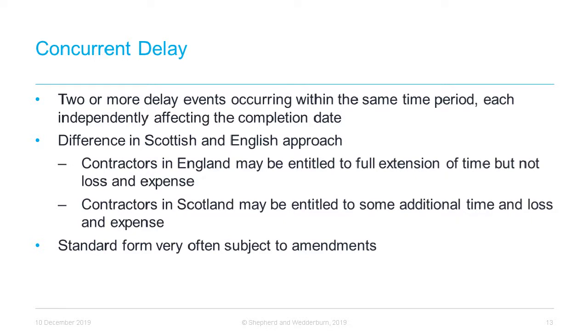It's highly unusual for the problems that materialise during construction projects to be discrete issues that do not impact on other activities in the works. Rather, it is more common for problems to be interlinked and difficult to separate. These problems are often attributable to both parties. These situations can be referred to as concurrent delay, defined as two or more delay events occurring within the same time period, each independently affecting the completion date.